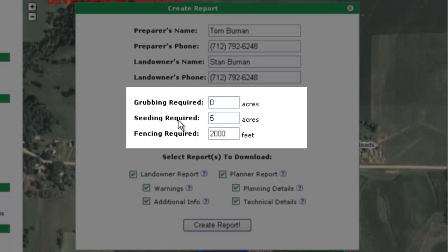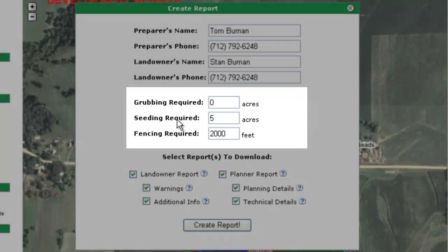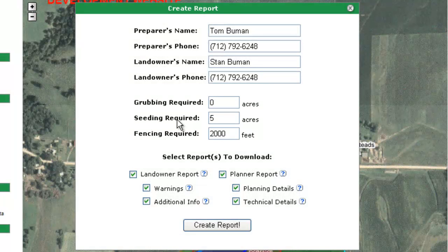Now, remember, the average costs here go back to a table earlier. If I wanted to change those average costs, I needed to do it earlier in the program, in the table option where I change my average cost for my earthwork. So it's important that I do that before this time, because those average costs will populate costs in my report.